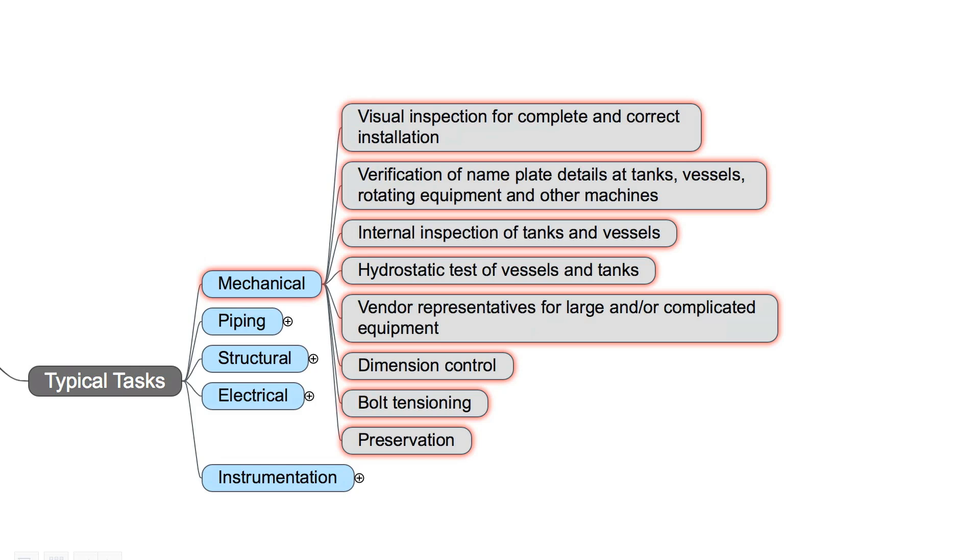I have experience from one plant where there was a column nearly 100 meter high and it took several weeks only to fill it up with water by trucks. Vendor representatives for large and or complicated equipment. It's a good idea to have the vendor representative on site for complicated compressors, blowers, pumps, big pumps and so on. Dimension control is included in a typical task, bolt tensioning, preservation.